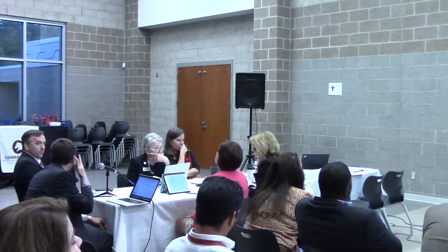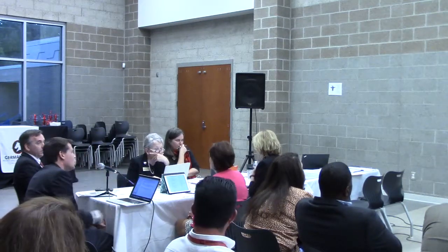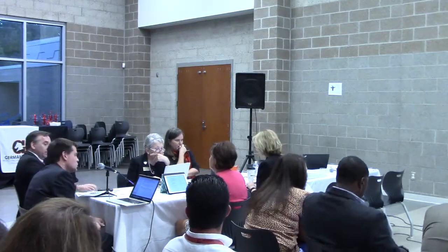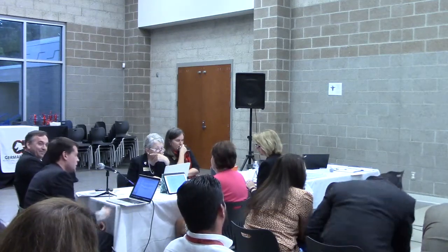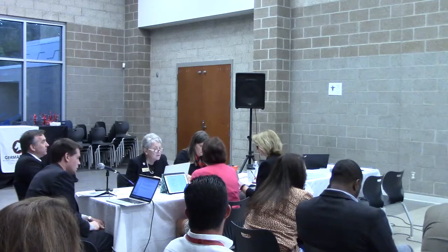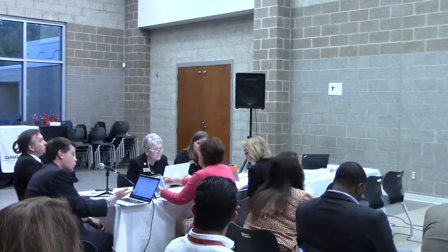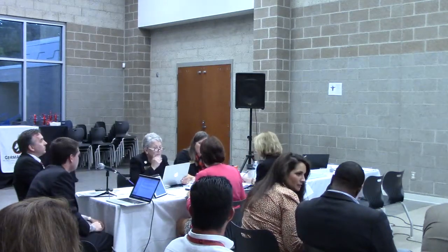Priority three, I think that's what the original committee was aiming for. It was 3 years ago, but if I'm remembering back, priority one was what you said, boilers. School can't function with leaking roofs, HVAC units. Priority two was somewhere in the middle, non-critical, but still got to be done. Priority three was deferrable and desirable. Bring a facility up to the district standards, and improve the quality and convenience, but there could be more. That's a good point. There could be a whole lot more added to that. This is good, just going forward.